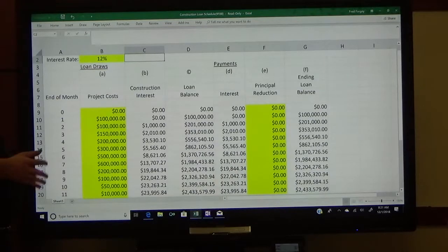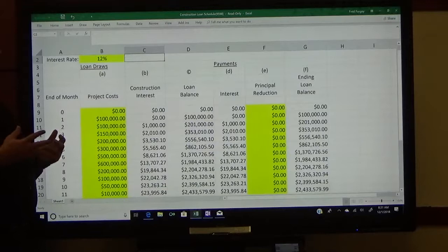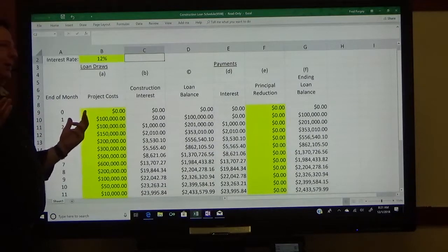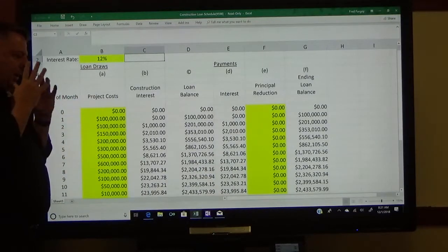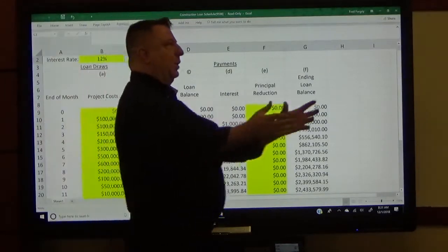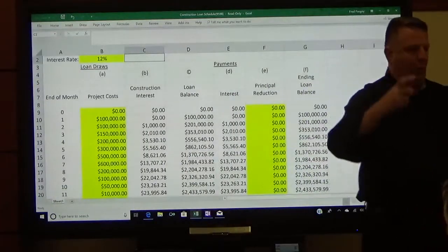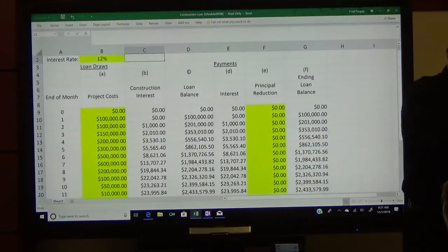Well, you have a lien on the property and on any improvements being made to it, but the line of credit is the only realistic way to reflect the current value of the asset. Also, the lender wants a direct connection between the work that has been done on the site and the amount of money they have fronted you in the draw.